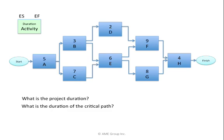I begin with activity A. The earliest activity A may begin — since activity A is the first activity, the earliest it may start is day 1. If it runs 5 days, day 1, 2, 3, 4, the earliest it may finish is day 5. Activity B may begin the day after activity A ends. Therefore, B may begin on day 6.